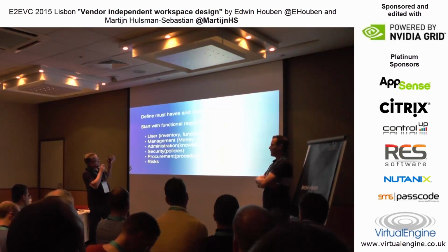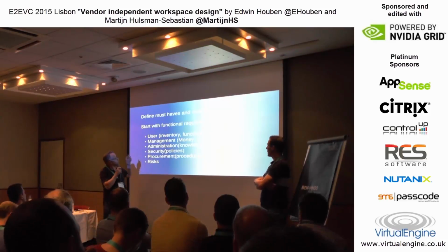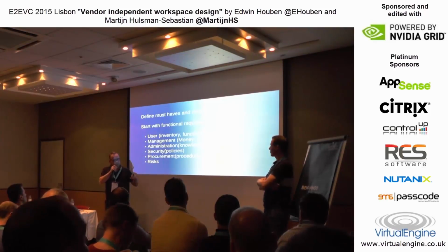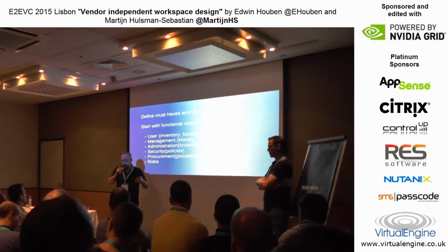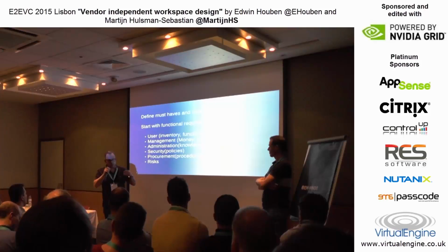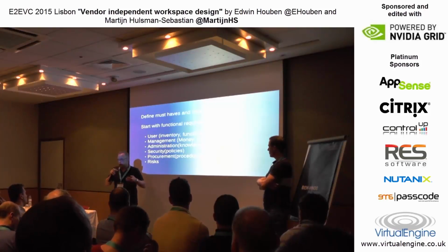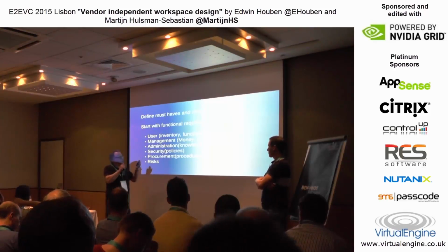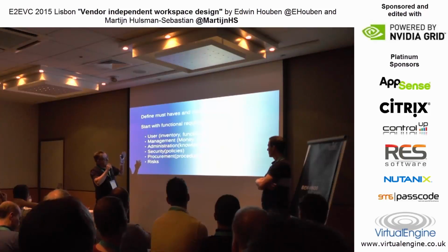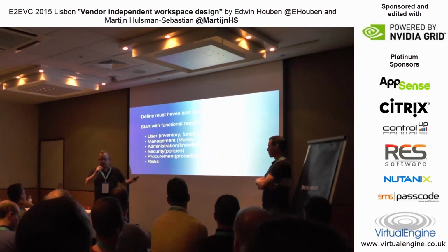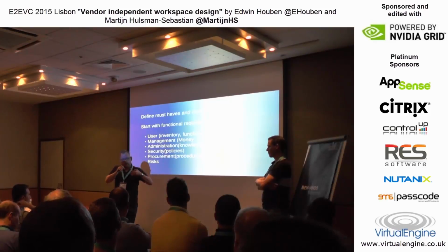And the other one, and I think that's a big one, the user inventory. If you have the possibility to use a tool to make a complete inventory of the customer, use a tool like SysTrack from Lakeside, do it, because it will give you a lot of insight into what's happening in the current environment of the customer. I asked them in week 1, I want an inventory of your complete environment and I want to use a tool for that, can we do that?